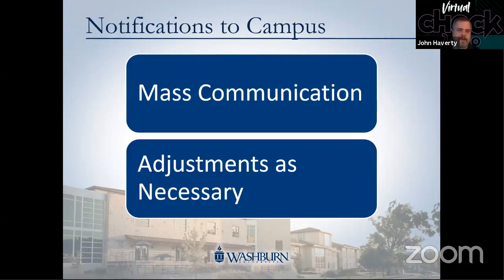Just going through a little bit on communication. I think this is probably obvious, but as I mentioned, we communicated prior to the lease being put in place. We sent mass communication to the campus about when we were going to be in an area to do an installation. Then we slightly modified that, because we found we were reaching out to department chairs or department heads to let them know we were going to be in the area. Sometimes it didn't always get down to their staff, so we'd show up and people didn't know we were going to be there.